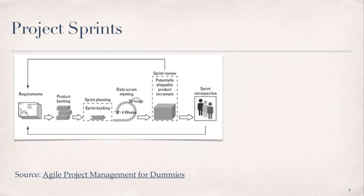Recall that the product backlog encompasses the complete set of user requirements included in the project charter, which are presented as user stories. The sprint backlog is the set of product backlog items that have been selected for the sprint, along with a plan for delivering the product increment in order to meet the sprint goal. The increment produced is the sum of the product backlog items completed during the sprint, building on the value of increments produced in all of the previous sprints.